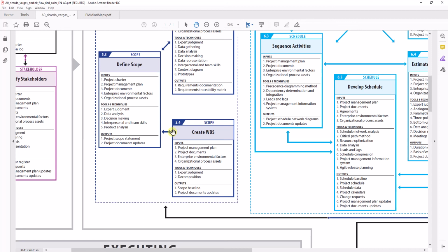Imagine you are making a dining table. The entire budget for making the dining table is like 10,000 rupees. But by saying the legs of the table somebody will make, I will give 500 or 1,000, 2,000 rupees for that. For making the top of the table, another 3,000. For painting, which is one activity in the WBS, I will allot another 2,000. You're able to track where this budget is spent and to forecast how much money will be needed, and all those.